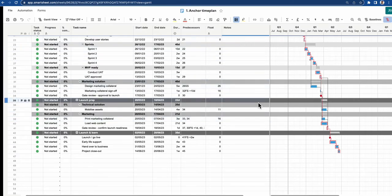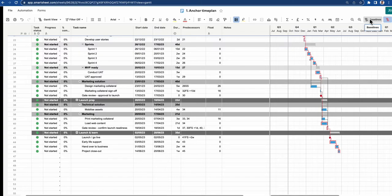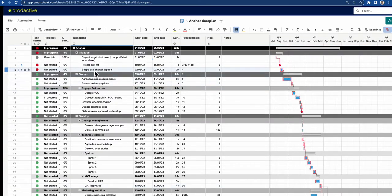So the next piece is baselines — absolutely brilliant. What it enables you to do is baseline a project. At the start of the project, what is the date agreed with the management team that we're going to deliver on? Once you've gone through planning cycles, made sure it's right, and you're happy to commit to it — that's your baseline. It's your best estimate at that moment in time.